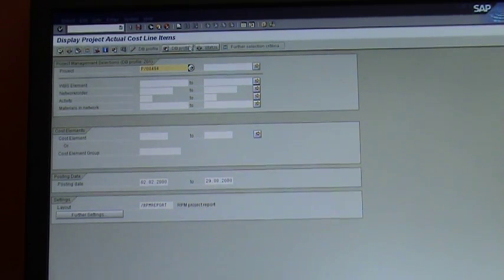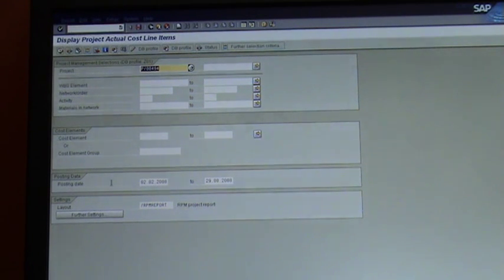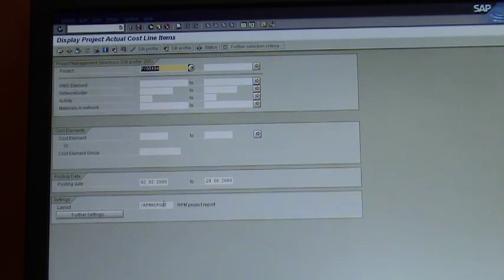What I'm going to show you now is three areas which are really important. One is your project area, where you specify which project or projects you're running. The other one is the posting date — from what period to what period. And the other one is the layout that you're going to be using to run this report.